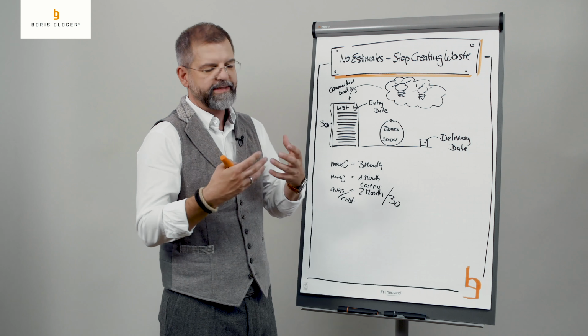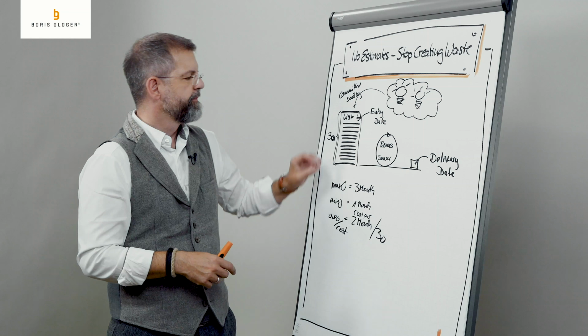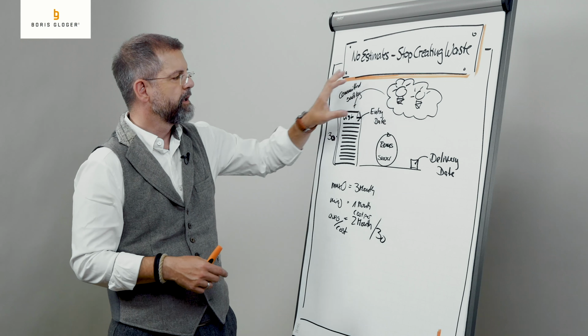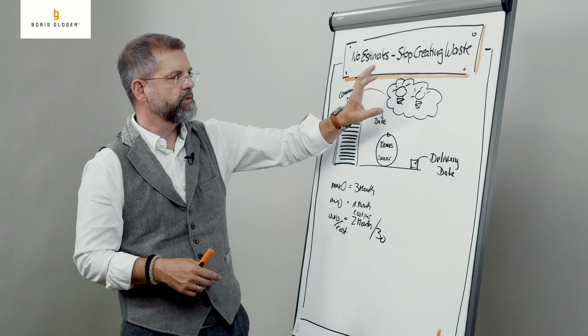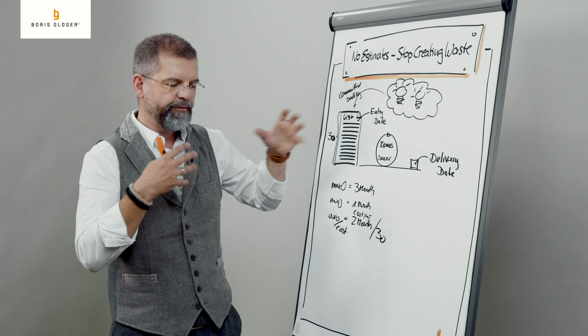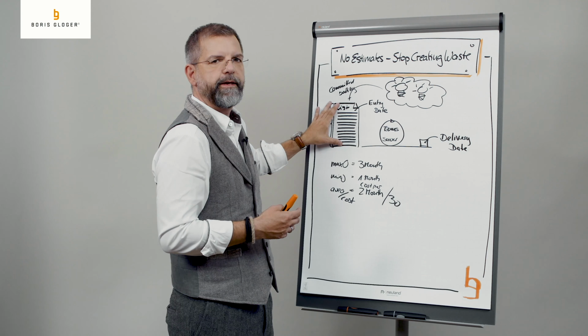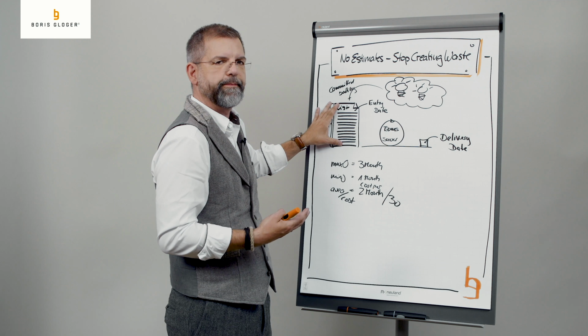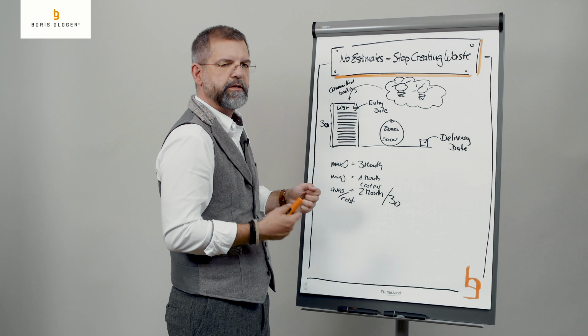Or the faster way to see it: typically the demand of people is so high, and they create so many ideas, that you feel forced to increase the number of features in your list, and then you know something is wrong. So you have an early indicator, an early warning sign.